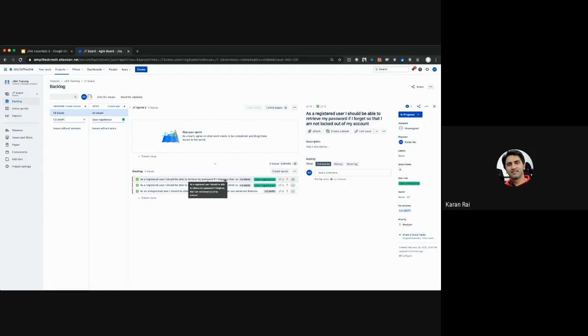We all set up points and then share them together, which is why it's called poker. That's how poker works. So that's how it happens in reality. So you don't get those biases, and then you of course have the option to discuss and align on a commonly shared understanding of what story points each story should be given.